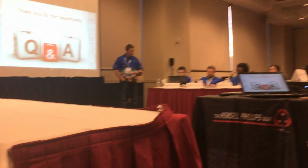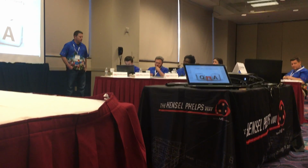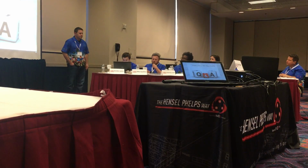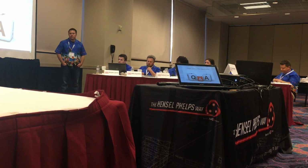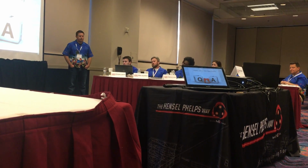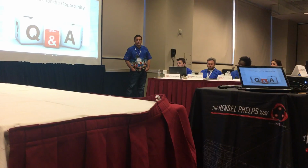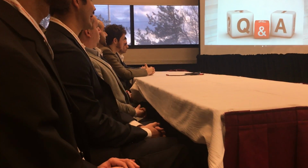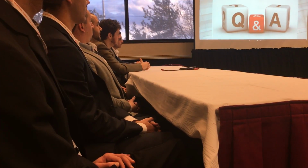Okay. And you said you're gonna remove the skin for obviously a couple reasons, to get the MRI and CT in, get the studs in, get the material hoist in. Where are you gonna store that skin? We would store it in the basement, the parking structure, set up a temporary wood structure or something enclosed to make sure it doesn't get damaged, transported there safely until it's ready to go back in.